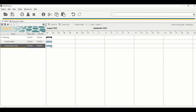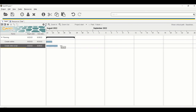For 'Create Outline' the duration will be one day, but 'Create Video Script' will take two days. To change the duration of a task, move your mouse to the task bar until you see the two-headed arrow, then right-click and hold to drag it. For example, drag it to five days, but here I'll allocate two days for 'Create Video Script'.